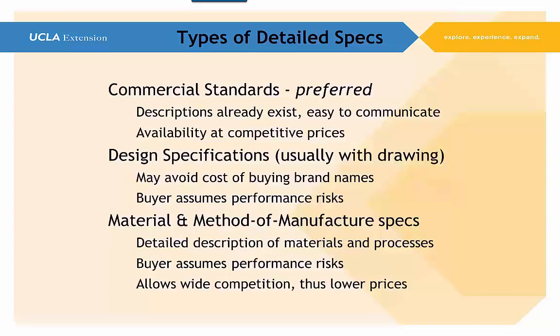The best way, the preferred way, is if we can use commercial standards. And one of the things about commercial standards is the fact that most all firms understand them. Most all skilled subject matter experts in those applied fields understand them, and they are achievable. We're not asking for something that's specially priced or specially developed that's going to be very expensive and hard to make. We want to make sure that we have good design specifications, either with drawings or however we write it.